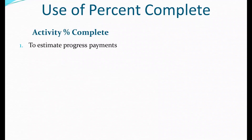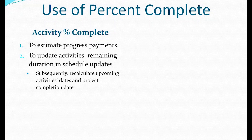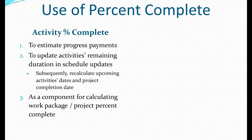Use of percent complete. If we're using the activity percent complete, we do that to estimate progress payments because it's based on the percent complete as well as the schedule of values. We use it to update activities' remaining duration — this is a very important thing, and we'll have another slide on the remaining duration. Subsequently, we want to recalculate upcoming activities' dates, start dates, finish dates, and project completion date. It has a huge impact on resources, crews, and so on.